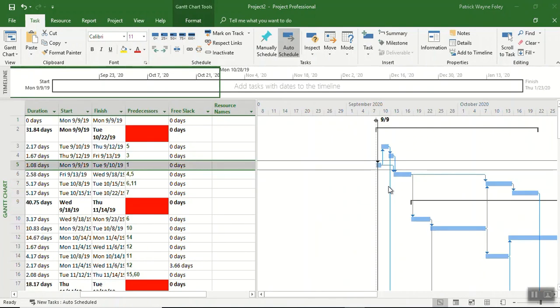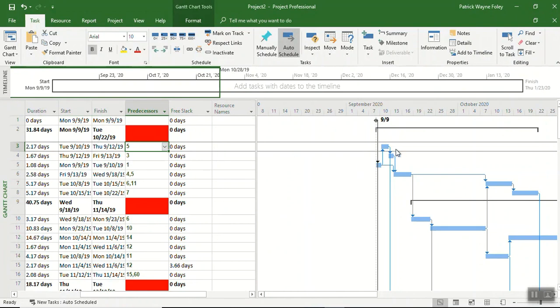Now you'll notice that we can have a look at the Gantt chart. The people who have got quick eyes will notice something interesting. If we look at slack days and we go across, we will notice, and we've got to be careful with some of these arrows because we've got these predecessors a little bit awkward. That's why sometimes you may want to tighten this over here, but this is sort of good enough as a beginning. You'll notice that even though they've got 0 slack, there's no great indication that they've actually got 0 slack.